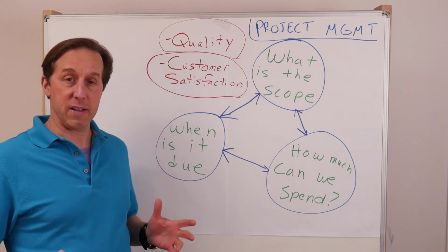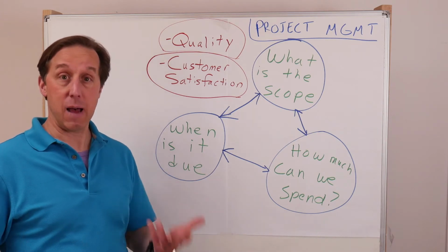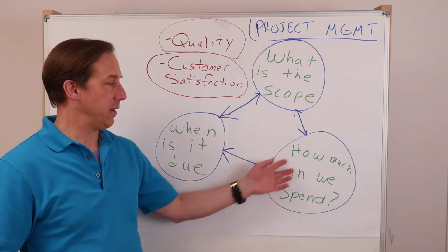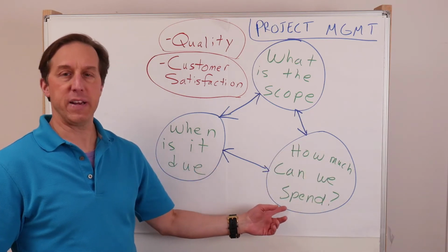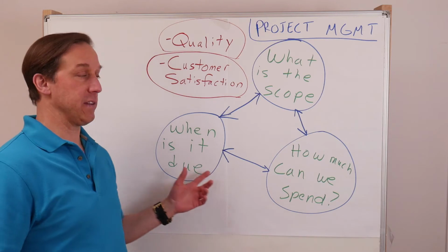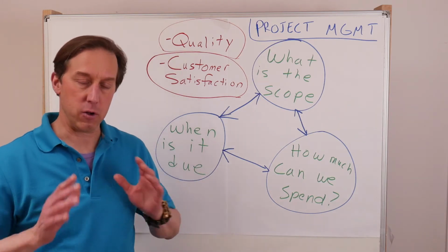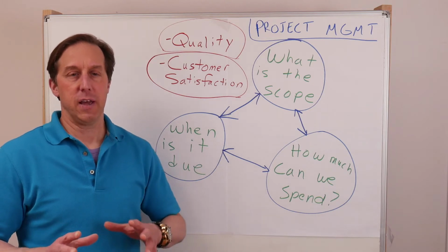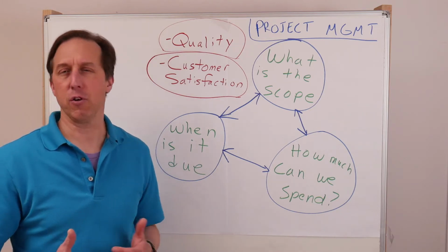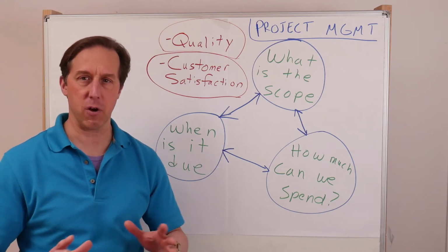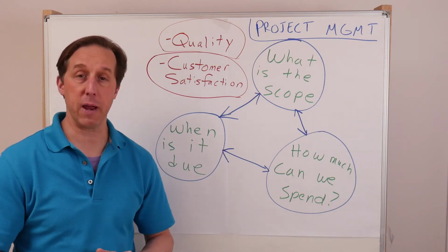However, if we can spend a lot of money on it, maybe we can hire a lot more people, maybe a team of 10 or 12. I mean, it scales certainly. And even though we're spending more month to month, we can get it done sooner. And I've been on projects where the cost was absolutely fixed, but we had flexibility on time frame. If it took another 2 or 3 months, that's okay, as long as we kept our costs down, the customer was okay with that.